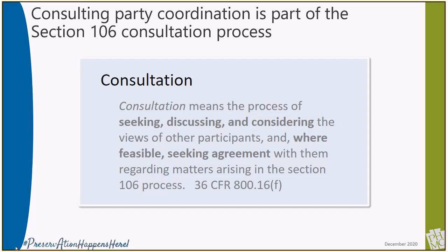The National Historic Preservation Act recognizes historic preservation as serving the public interest. The intent behind the Section 106 consultation process is to ensure that there is adequate consideration of historic preservation interests in federal project planning. The regulations to implement the federal law are found in 36 CFR Part 800. The federal agency or those acting on its behalf, such as a DCED grantee accepting HUD funds, is responsible for consultation. The definition provided on this slide is taken from the federal regulations and is very straightforward.